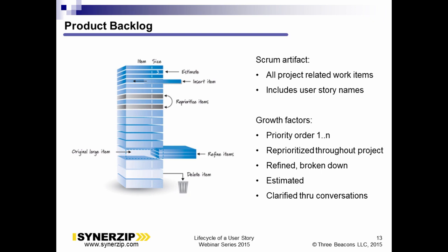How can we help user stories grow up? Recall that user stories are purposefully high level, and as such, they require clarifying conversations. One way is the Three Amigos method — a collaborative discussion amongst three project roles: developers, QA, and either the product owner or the business analyst. This method is not meant to be restrictive — the more participants the better. Think of it as a minimal requirement that these three roles be represented for a good clarifying discussion. Stakeholders, customers, marketing, and business roles are all welcome if available. These conversations spur the growth of a user story to the point of becoming more and more clear.